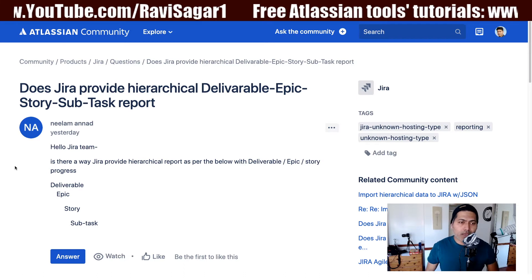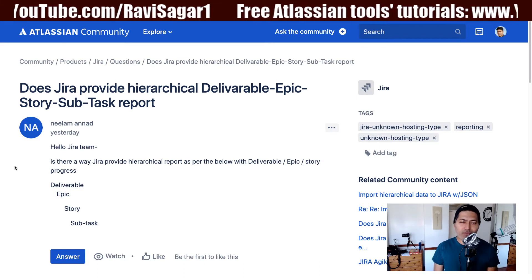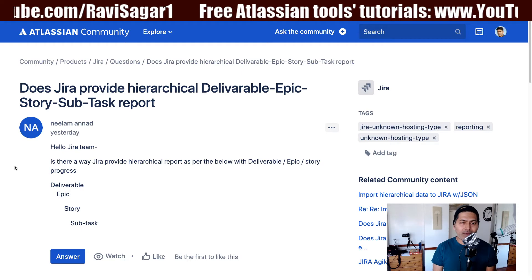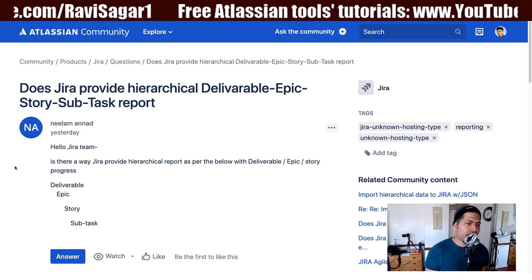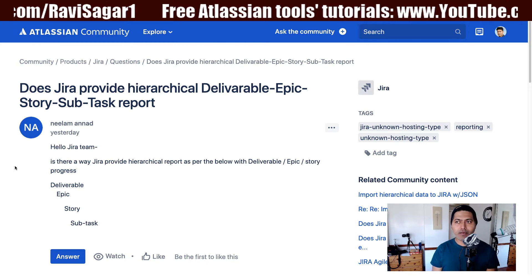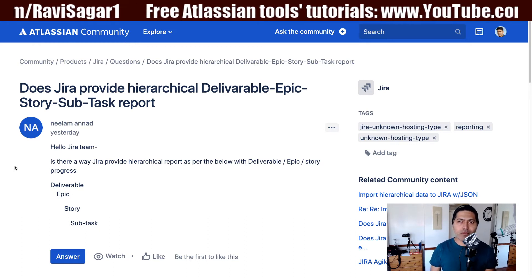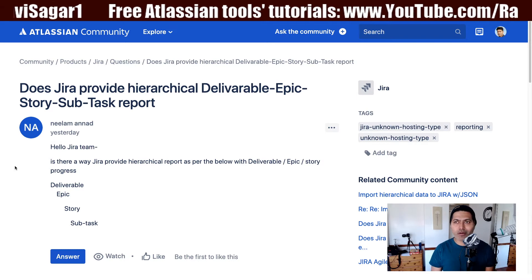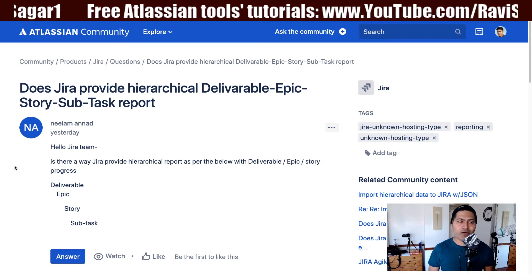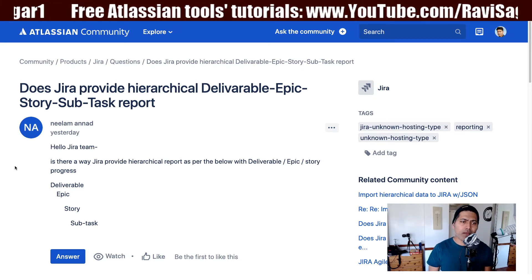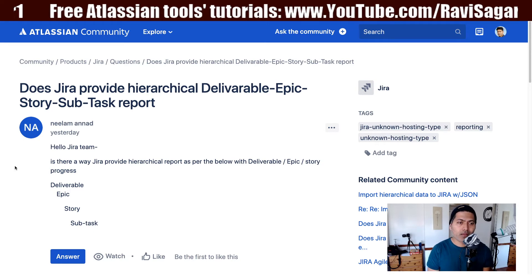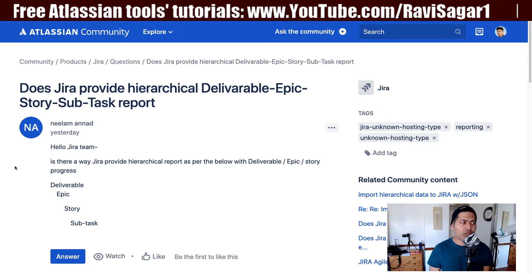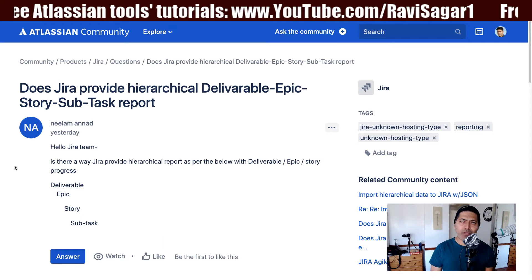I think we have talked about this before. If you are using Jira Software, you have some way to have this hierarchy in your board where you can take a look at the epics and all the stories under them, and also the subtasks. It may not be like a simple tree-like structure, but you can visualize what stories are part of epic one, epic two, and so on. But you're limited to epics and stories only, and maybe subtasks. For viewing subtasks, you need to go to the actual active board — they are not really visible in the backlog view.